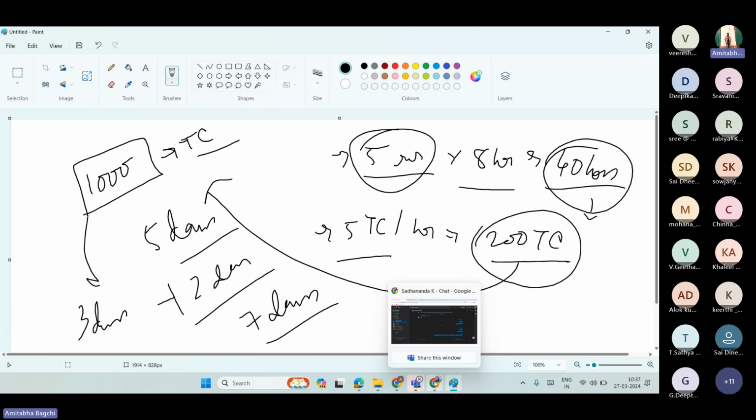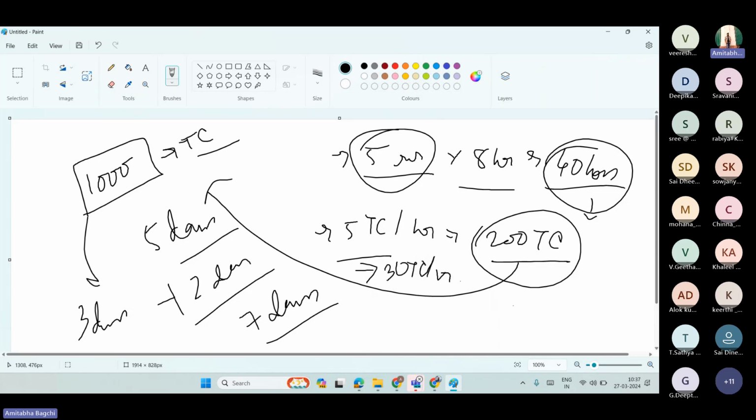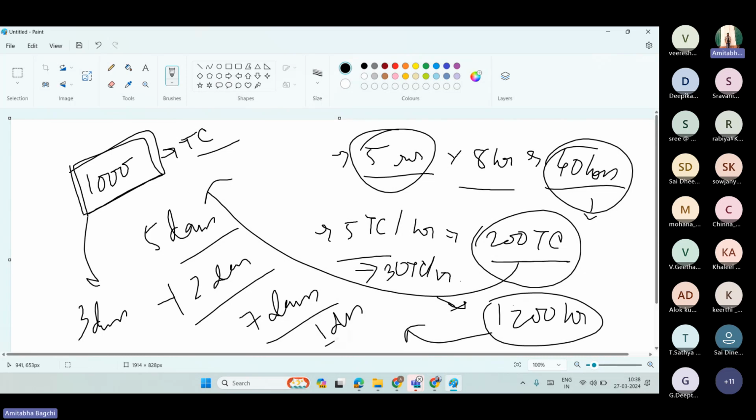So it's clear, that's how we give a proper estimation, and this estimation is required not only for test case writing. Now execution, I have a pointer that, okay boss, my team takes maybe 30 test cases per hour for the execution. Never possible, okay? I'm just saying a rough figure. It actually goes around 8 or 9. So if I have to execute 1000 test cases, 30 cases per hour means how much am I getting? 1200, right? So I'll say, okay boss, my team can do it within 1 day. Basically it happens, but I'll take 0.5 day as a buffer. So I'll say 1.5 days for the execution only. So I am writing for 7 days, 1.5 days of execution. So 8.5 days is covered.